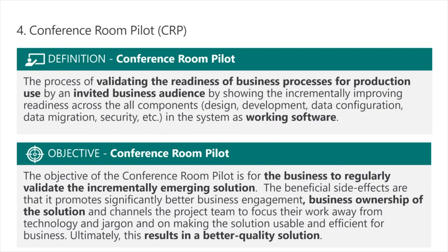But the idea is that you're getting your invited business audience to say, yeah, you're on the right track. That looks like it will work for us in production use, right? Now, the business is not signing their life away, right? This does not remove the need for user acceptance testing or SAT or whatever other test cycles you might have, where you're actually going through with your hands on the system and validating it. But what it does is make sure that what you're delivering is not going to be a surprise for the end users, right?